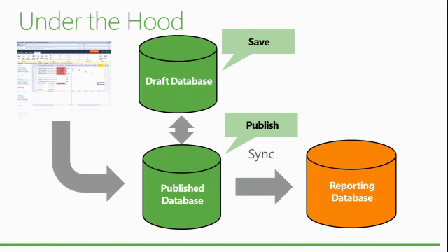So just a refresher about what's happening when you submit your timesheet. Let's say the single entry mode, or even if you don't use the single entry mode, because that applies also. Everything that is displayed and updated in PWA lives in the published database. Everything that is just saved from Project Pro, for example, lives in the draft database. And everything that is published also pushes data, after it has been updated in the published database, into the reporting database.